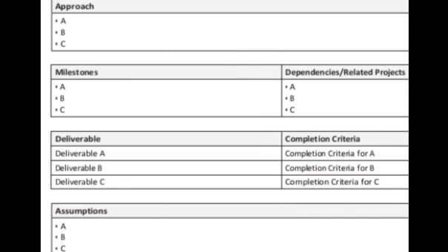You understand? Now, let's take for instance, the first milestone was to dig the foundation. Then the second milestone was to raise the blocks of the house to the roofing level. Now, milestone B is dependent on milestone A. Why? Because for you to be able to raise the blocks of the house, you must have done the foundation. You cannot carry out milestone B, raising of the blocks to the roofing level, without having done your milestone A.